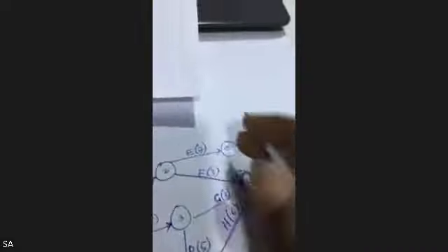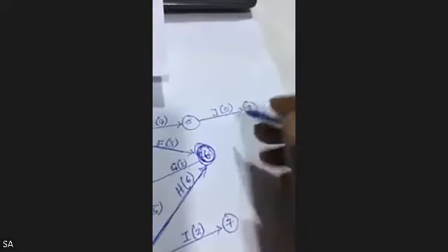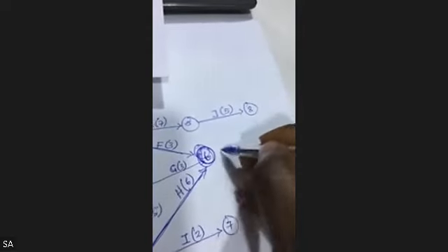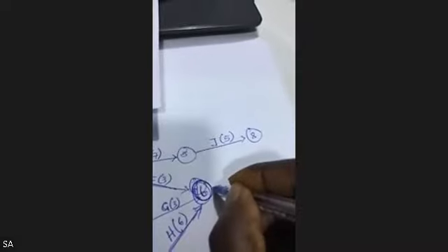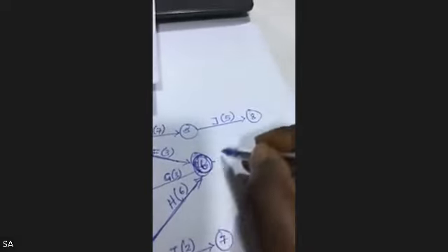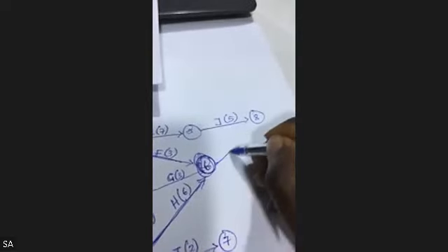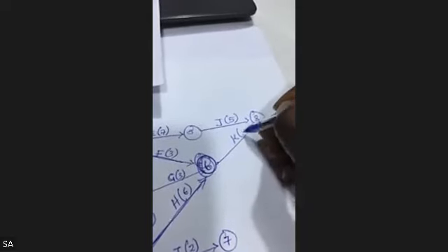So let's continue and look at K and L. They both must take their starting point from where this ends. So I have my K this way. Before I draw my K, remember that JK must have the same nodes. So should I take my K straight or up? I should take my K up because they must have the same nodes. So this is K. Activity K is 4.